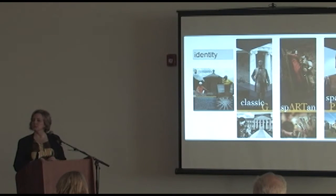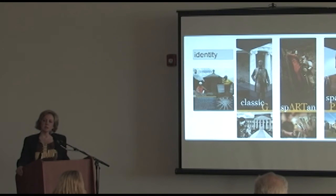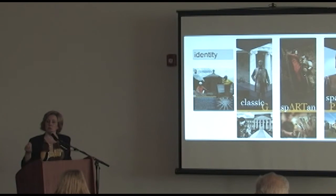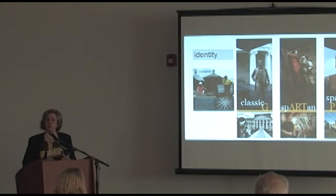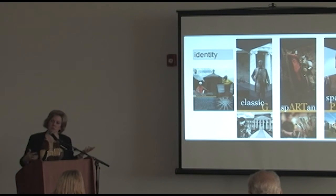Did the 39 month construction period include the CM at this level? The CM was responsible for pre-construction services during the design phase. They were selected on a qualifications-based selection process, as our team was. During design, they looked at constructability issues and cost. We were still in advanced planning when they came on board. Now we maintain an independent cost estimator of our own, so at every phase we did our estimating and they did theirs, and then we had cost reconciliation meetings to resolve where discrepancies were, who was right, and why one or the other made certain assumptions.